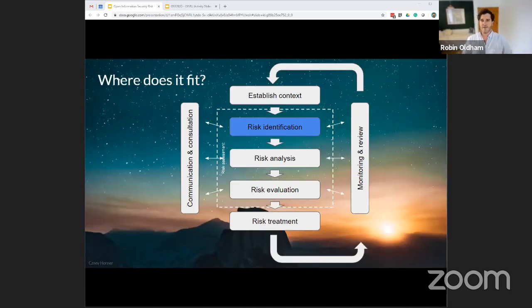So you'll likely be familiar with risk management as a cycle, and people often talk about doing risk assessment, then risk treatment or management, and monitor, review, and cycling around. Actually, for assessment, decomposing that, we can break it into risk identification, what may go wrong; the risk analysis piece, how may it affect us, what might the negative outcomes be, how severe might they be, how frequently might they occur; and then risk evaluation. So what are you actually going to do about it? Do you care enough to do anything? Is it acceptable to the business?